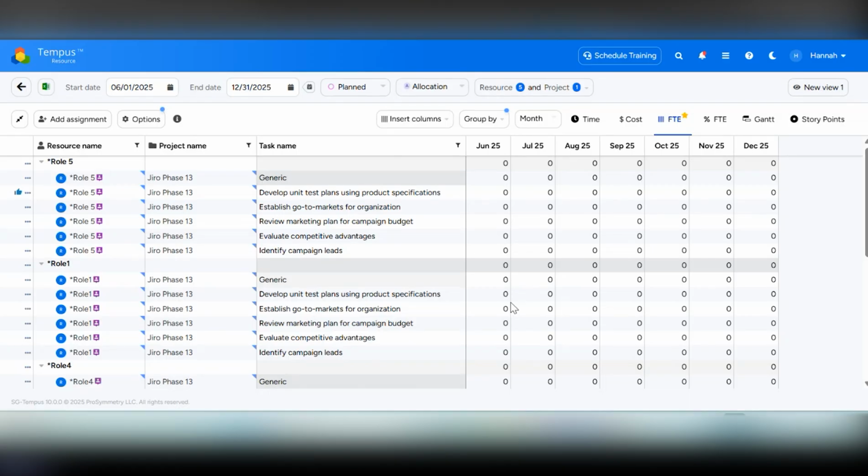Within version 10.0, we introduced skill-based planning for demand planning resources. This makes it so you can easily identify which named resources should take over the assignment from that demand planning resource based on their skills and their attributes. These can be configured within your bulk project allocation flat grid screen or your single project allocation screens. So what you can do is you can go ahead and assign allocation to your demand planning resources.